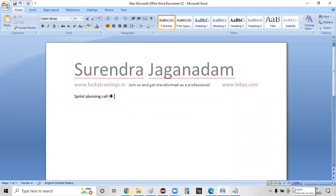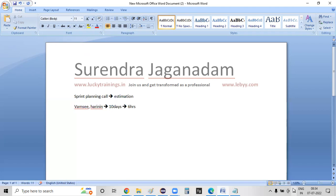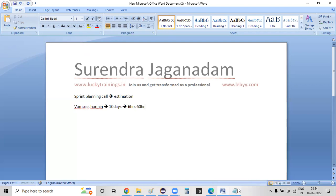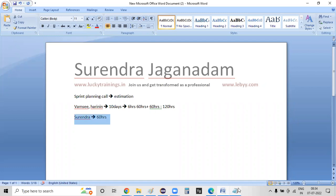As part of sprint planning, requirement by requirement estimation. One developer — Harini — sprint is 10 days. In agile, six hours working per day, two hours meetings. Ideal case: six hours working hours times 10 days — one effort is 60 hours. So every developer will spend 60 hours. Surendra is a tester — so 60 hours for the tester. Overall, the tester is 60 hours effort and the developers will be 120 hours effort to spend.